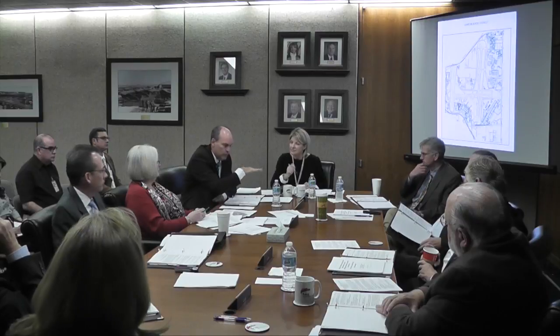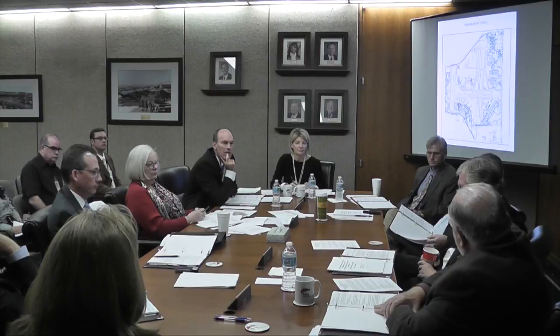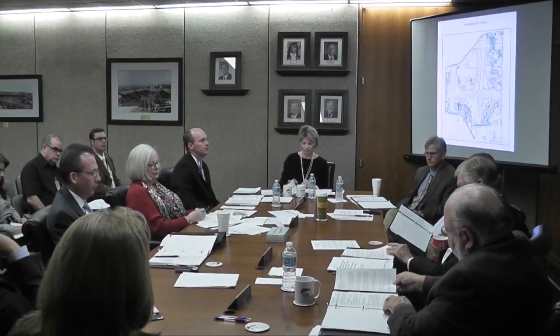The other challenge for us is on the other roofs that Jeff mentioned. When we started this effort, putting the budget numbers together a year ago, we put in $500,000. Yeah. So we need to try to find some more money. So we'll actually get another look at this next month. Yeah. This is just to accept the bid. Yeah, it just holds the bid.